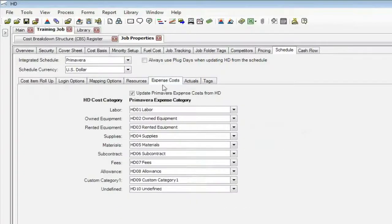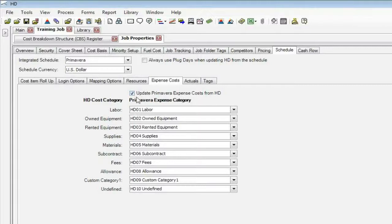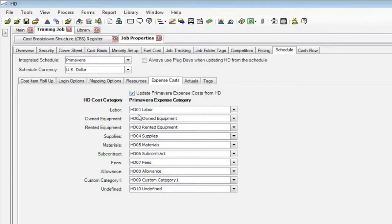There are other costs also that Hard Dollar has that aren't always from a resource. You may plug, you may have some quotes, you may have some ad hoc entries. Well, we'll set those up. Primavera has the ability to have a field or a section that they call expenses. So we'll send those additional dollars out as expenses if you want to, so that Primavera has the total cost.